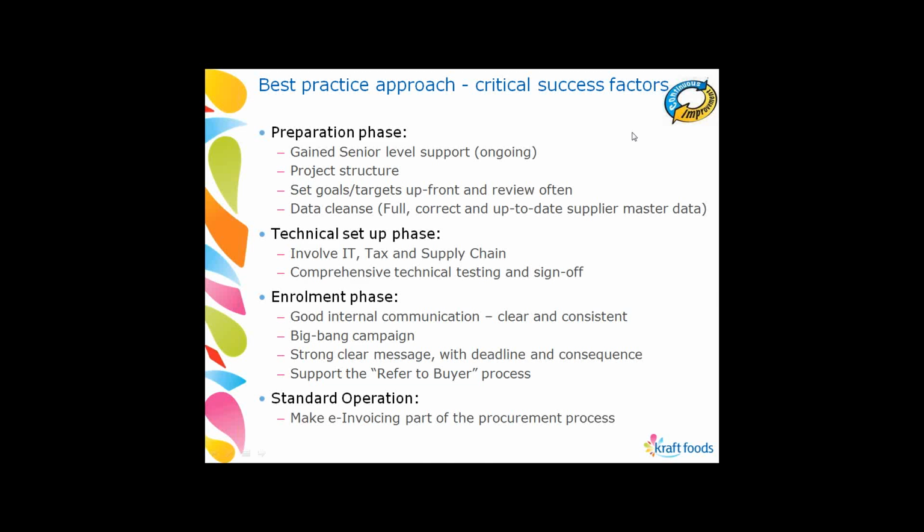And data cleansing is one of the important parts of the preparation phase as well. We spent a lot of time cleaning up the data, providing correct and full information for our supplier master data. The technical piece, Ruth already talked about that, so that was very successful. We had very good cooperation with the OB10 team. We involved from our side the tax team, so we were compliant, following the legal requirements, because we did a big bang campaign for all countries in scope. So that was a good cooperation as well.